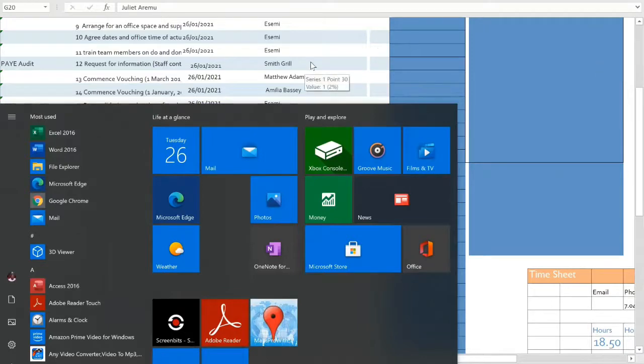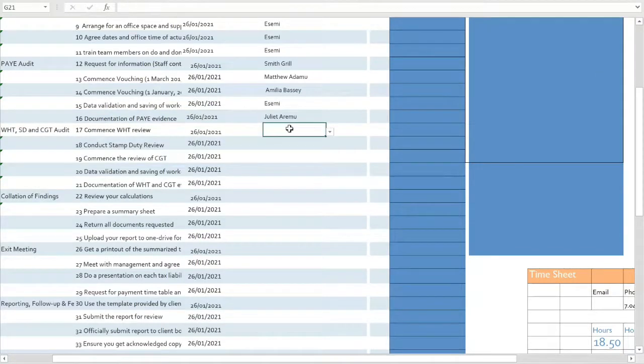The team members are producing reports, the team members are updating the progress of each activity, and if the team leader disagrees based on actual results, you can say, okay, this percentage you want to put for the performance of this particular activity is wrong. It should be 10%, it should be reversed to 20%, from 50%.